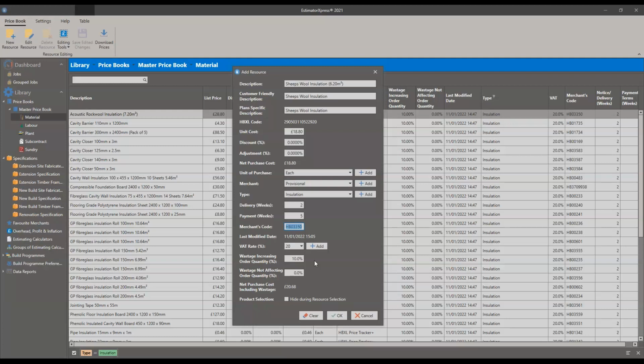The other thing with that as well is that those little nominal amounts, if you're not using the rounding tools, can just help you. Look at this when you order your order sheets, and it'll take you over whole items as well. So it puts you to the nearest whole item with some of the wastage. So if you know you need 100 meters square of something, but it only comes in 105 meters, then 110 meters will cover you. There. Once we're done and we're happy with that, we're going to click OK.